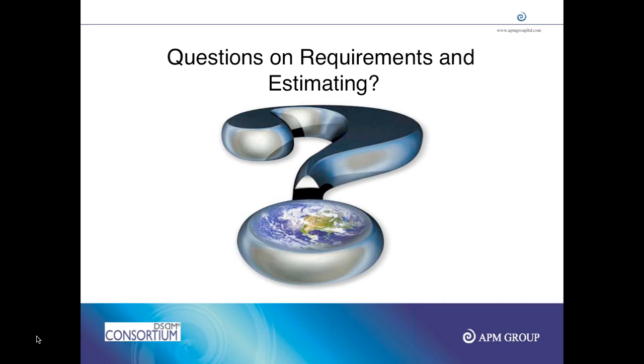We also talked about the estimates part of it. When you start, as part of feasibility, you make something called an outline plan. One thing common in all project management methods is that they recommend avoiding detailing. That is, you do not give exact estimates in the very beginning. You give ranges. So when you are in outline, you give a range of months, years, efforts or cost